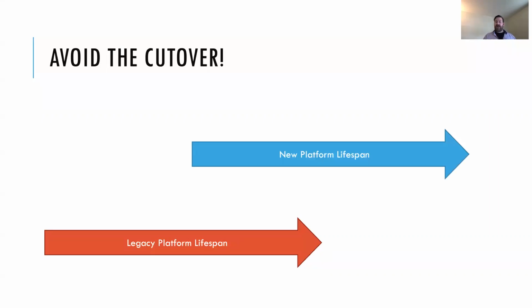And then you've got your new platform lifespan, and you say, well, the old platform is going to die here. We have to launch by this date. So we're going to get this new platform up, and we're going to have some overlap where you have two systems alive. And that impacts cost, of course. The longer you have both systems alive, the more money you're spending, the more overhead you're spending in keeping both going. And then you have this customer migration period. So you say, well, while both of them are alive, we want to get everybody over.